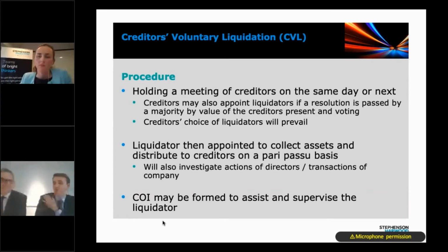And it's probably worth adding to that as well. It depends what jurisdiction you're in and the precise terms of your clause, but it's not always going to be the case that they're required to give full details in the notice. It's normally required to at least identify the event, but they're not necessarily required under the relevant laws to actually provide all the information you would actually need to assess it.